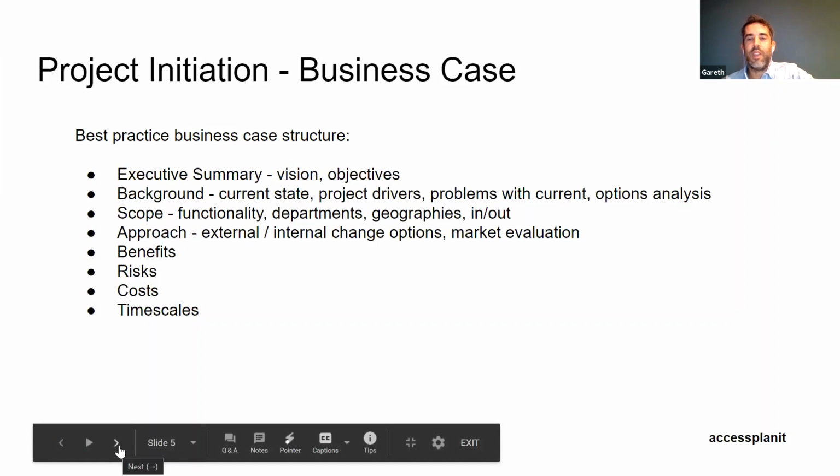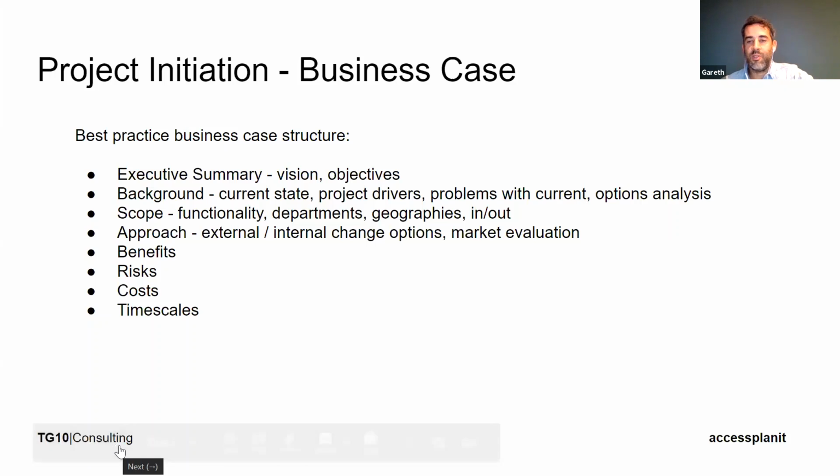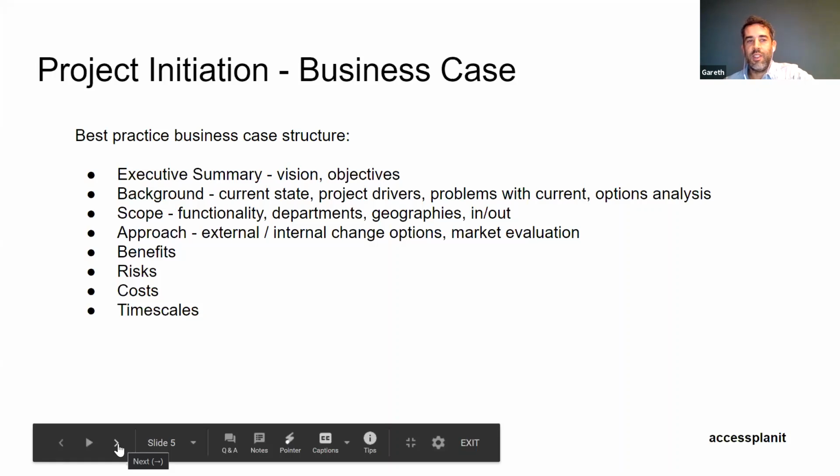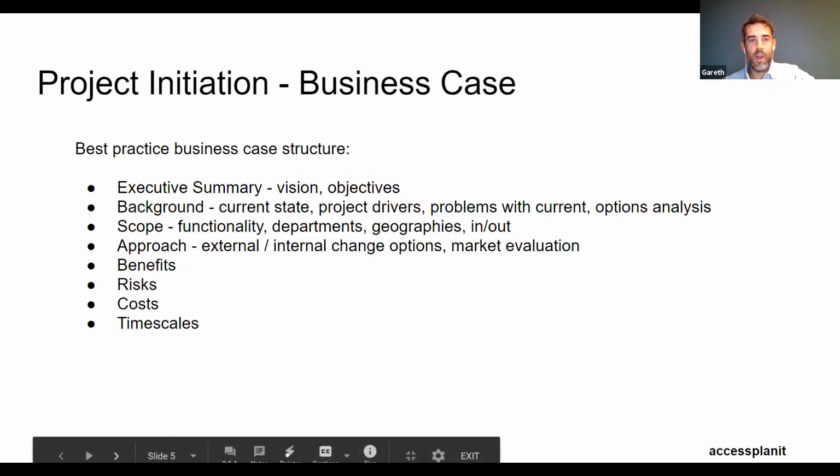Yeah, business case. I think something to remember here is that the business case is very important at the start of the project, but it's also almost like a live document that you need to continually refer to throughout a project. We put some headings here just to show what would go in a business case, but from my perspective it's about getting that message across that it's not a one-shot document. It's important to keep an eye on those risks, keep an eye on those benefits, as we'll come on to later in the chat.